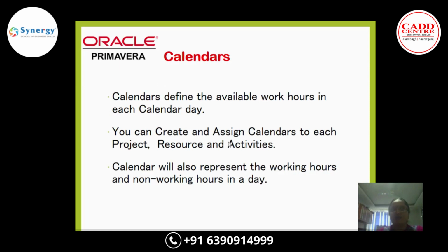So calendars are used to set in a project and its resources working time to accurately reflect your resource availability information, and the application uses your calendar assignments for even resource leveling, scheduling and other tracking issues. So calendar will display the working, non-working time for any organization, and it will also represent the working days and working hours in each day. So beside national holidays, some specified holidays and the project specific work time can also be specified.